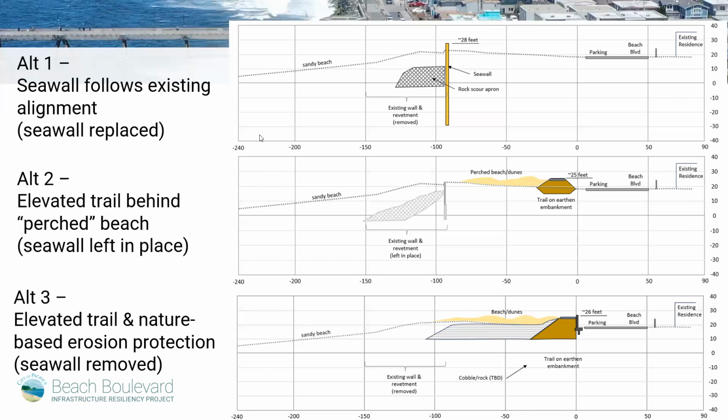So it just doesn't make sense to design for something higher than that, especially since the wall may not even last that long. It becomes a risk tolerance, capital cost analysis of how much protection we should be buying on day one, given these uncertainties as you go far out into the future.